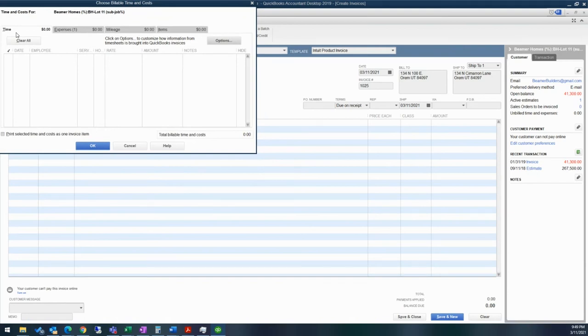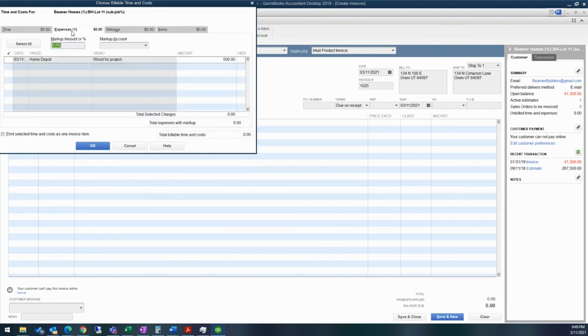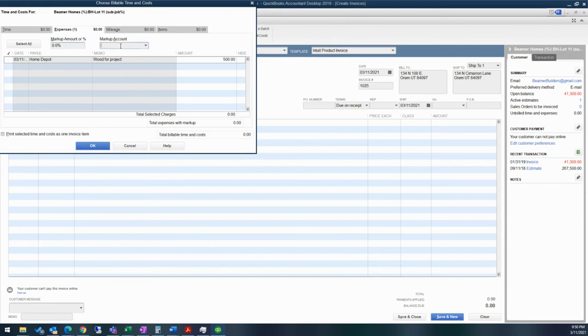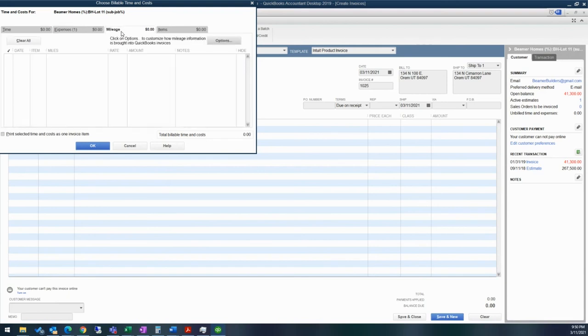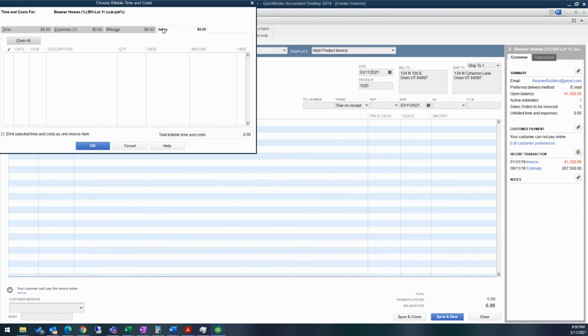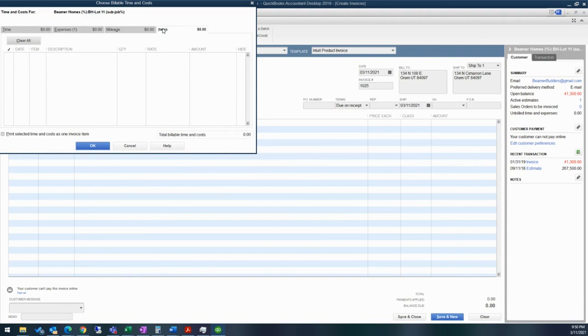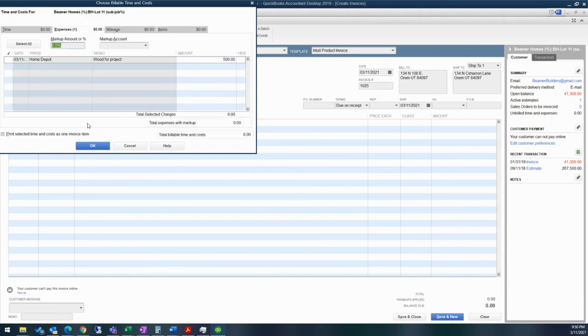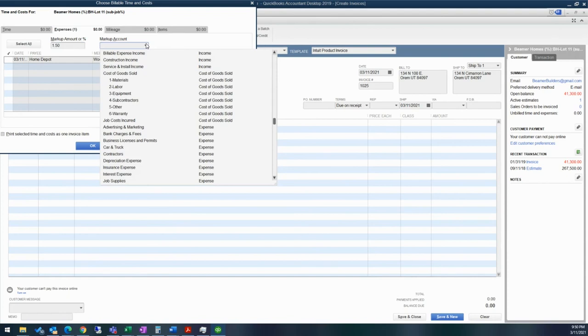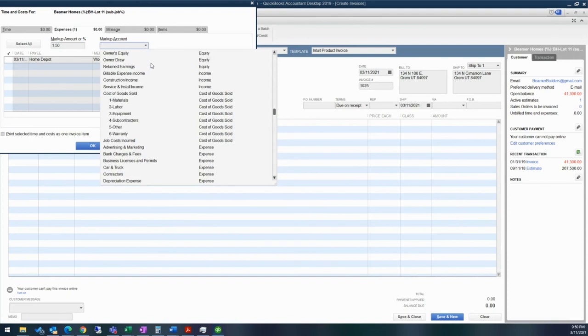And then if you have anything like a timesheet where you're coding that to a customer or a job, that will show up in this screen. If you have expenses like that bill that I just showed you for Home Depot, I can add it on here. If I want to, I can add up a markup amount directly on here. And I can even put it to a separate account if I decide that I want to be able to check out my markup separately. If you have any mileage that's coded to your customer within the payroll center, that can also be pulled in here. And then if you purchased any items and coded it specifically to an item as opposed to an expense account, that will show up here. So for example, if instead of entering that Home Depot as an expense, if I had purchased inventory and tracked it as specific items within my inventory, I can pull that in through here as well. So I'm going to go ahead and do a markup of 1.5.